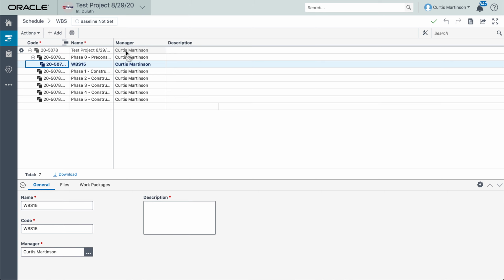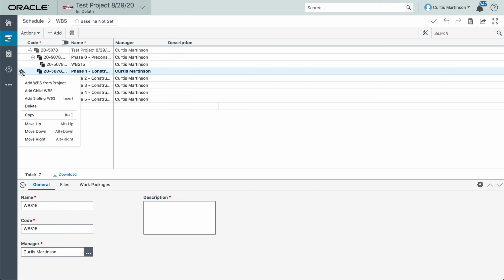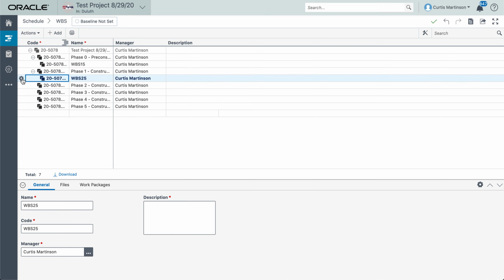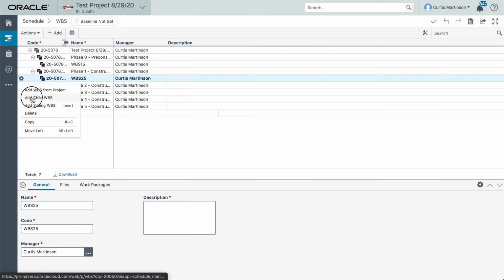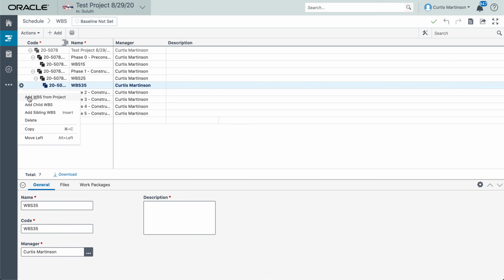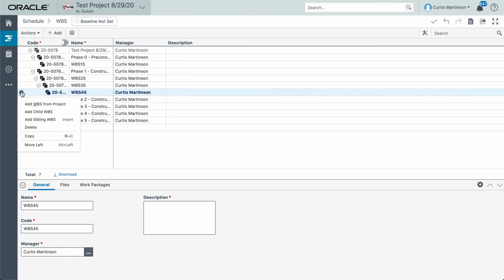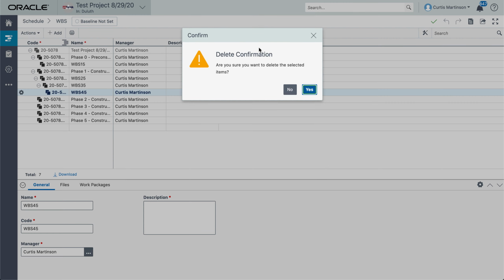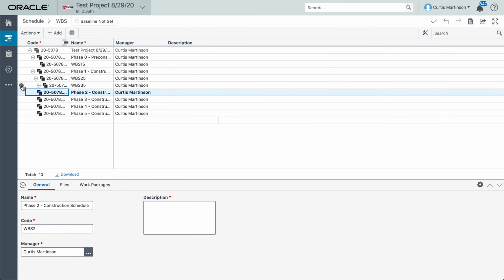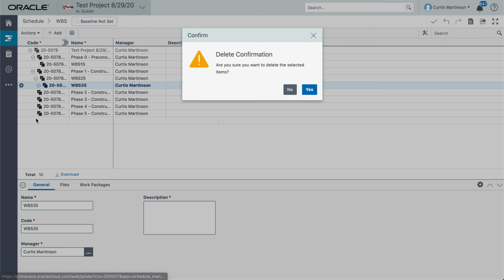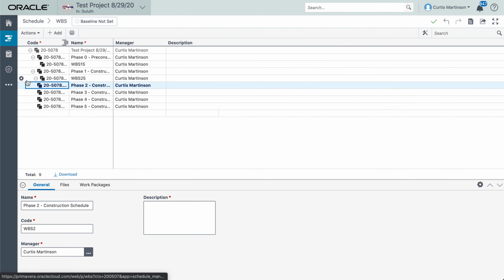We have one parent WBS here, which is the main construction schedule heading, and then I had these 6 siblings that I had pre-populated. Under each one of these, you can add in as many children as you want. You can keep indenting just by adding children, or you can take them away by deleting them by clicking on the gear and removing them from the list.